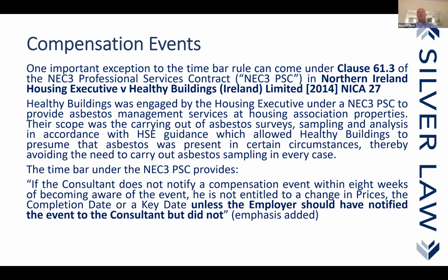Dear sir, please be advised that the regular progress of the works has been delayed by the following event: the late issue of information. As further particularised in our letter of the 1st of yesterday, we set down the full particulars of the relevant event, when information was required, when it was issued, and what was the knock-on effect. You will see from this notice that we've identified there was a 3-week delay during the period from here to here, and which will have a consequent knock-on delay to the completion of the works.